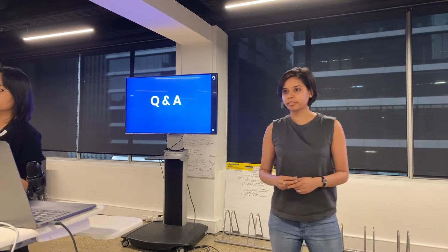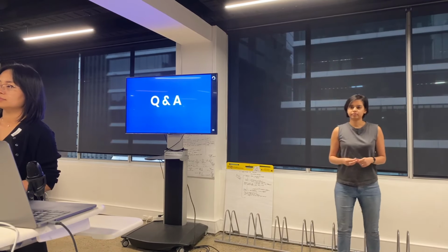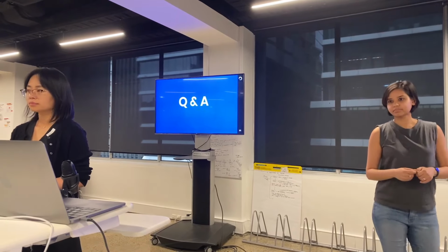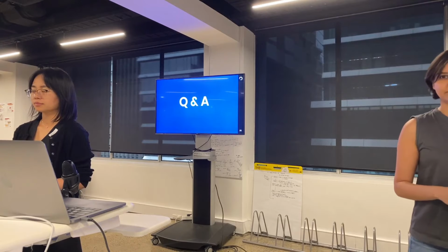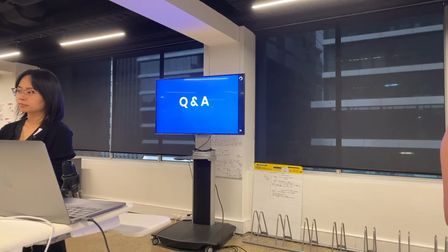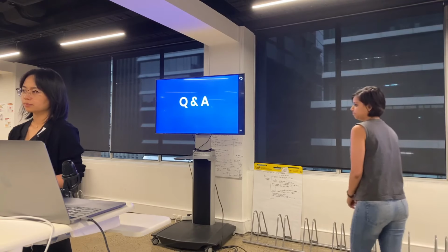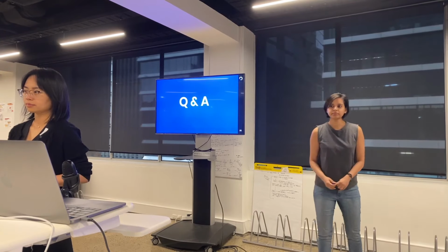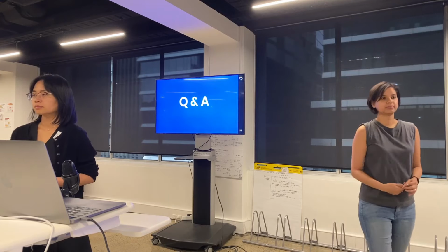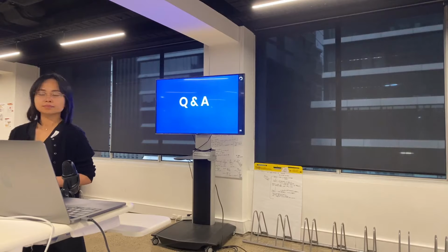Something else you may want to look at is going one step above an MVP to an MLP, a minimal likable or lovable product. If you just go with the bare bones, you're not going to get a lot of customer interaction or feedback, because if they hate it, they won't go back. So you want to prioritize the key minimum features we need to be a liked product, and then build off that to go forward. Thank you for that.